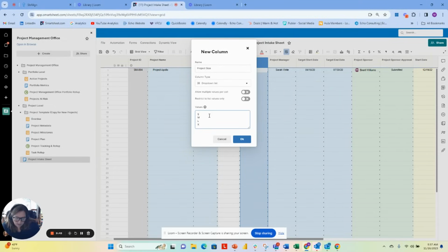Okay. Now, different organizations have different sizing. I could put the information right here and say, like under 50K or something like that, right? Or under 10K would be small, and under 50K. Now, this is like using dollars, right? Or using currency to size it. But the other thing could be under 2 weeks, right? So it's less than 2 weeks of effort, less than a month, right? So there's different ways to size. You can put it in the drop down.